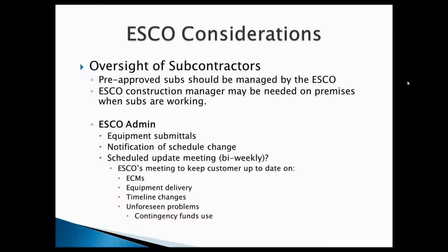All right, it's the ESCO's meeting, and the reason is to keep the customer up to date. You want to talk about the ECMs that are being worked on. You want to talk about equipment delivery schedules. You may want to change the schedule because of a delivery schedule, but you also want to reiterate your storing areas or staging areas with equipment delivery.